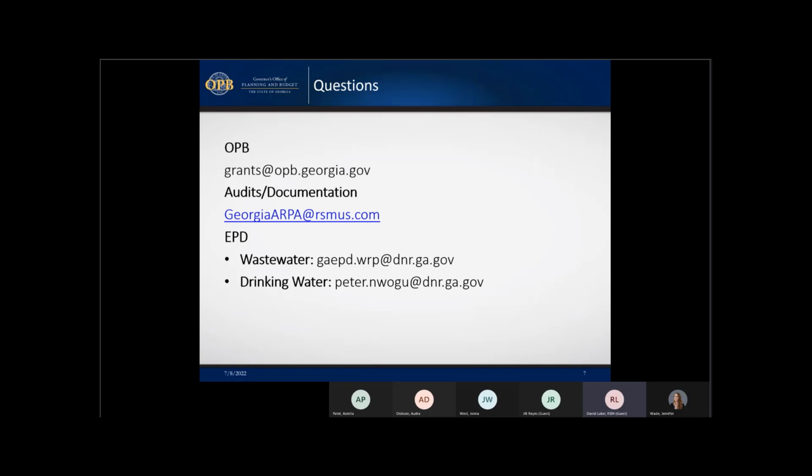One final component of our work is that we will be supporting on-site inspections and interviews of personnel on these projects, which will include but not be limited to discussions and investigations in regards to the disposal of materials or the importing of materials onto project sites, compliance with the environmental plan, that chemicals used on the project conform with EPA or USDA compliance requirements, as well as general compliance with local laws, ordinances, and other requirements that are dictated or directed by the local jurisdictions.